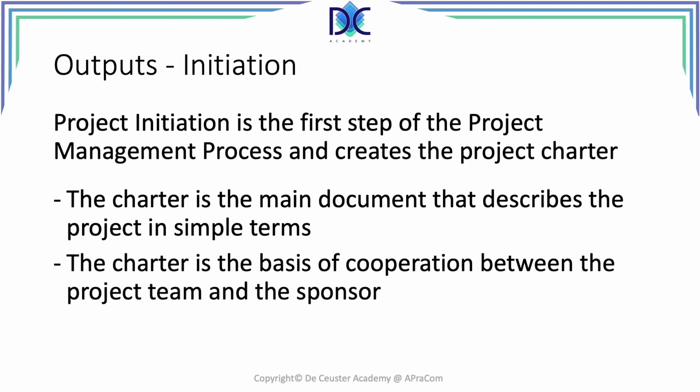The charter is the basis of the cooperation between the project team and the sponsor. In the early times of project management, sometimes people still considered the charter as being a kind of voluntary document. It was not necessary, it was not mandatory, but now we consider the charter as a contract between the different parties, and the project manager and the sponsor and the main stakeholder will be signing this charter.